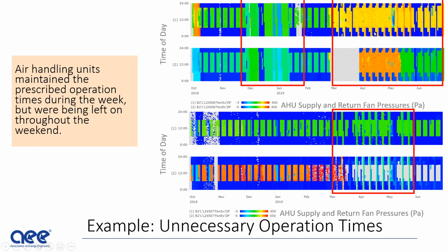But on the weekend, Saturday and Sunday, the units were running 24/7. That's something that we noticed there, where energy inefficiency was taking place. The units were running unnecessarily 24/7 on the weekends, and also something that potentially could easily go unnoticed.